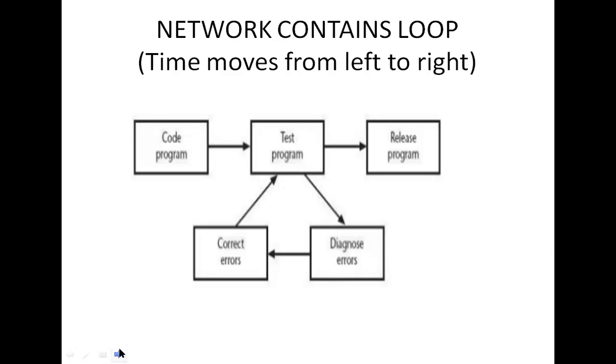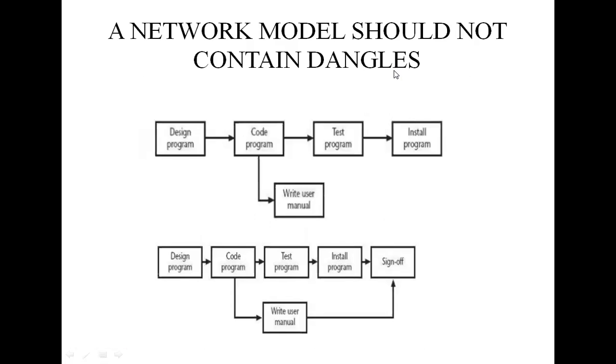Okay, next we move to dangles. So what is a dangle? A dangle is a dangling activity such as write user manual, which should not exist, as it is likely to lead to errors in subsequent analysis.